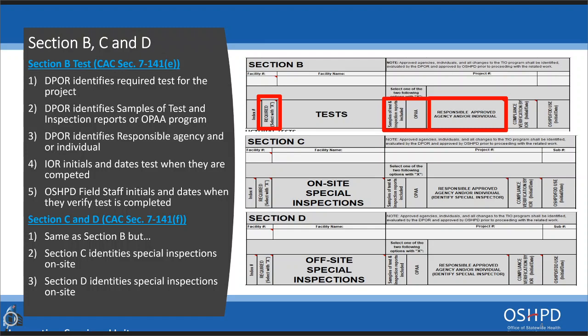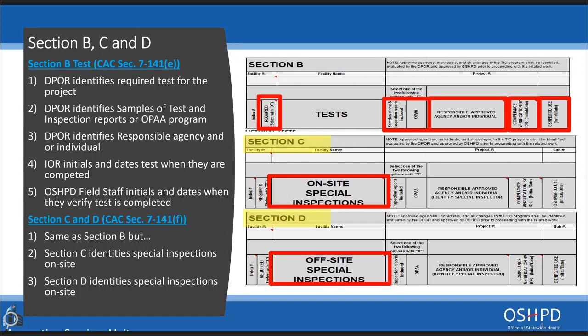The IOR identifies the responsible agency and/or individual who will be performing the tests and inspections, and indicates concurrence with the work of construction. If the inspection is performed by a special inspection agency, it is the IOR's responsibility to review the special inspection report to ensure the work passed. OSHPD field staff will initial and date their box only when they verify that the specific test is completed and all special inspection reports, IOR daily reports, and/or VCRs have been recorded. Section C covers special inspections on-site and Section D covers special inspections off-site.